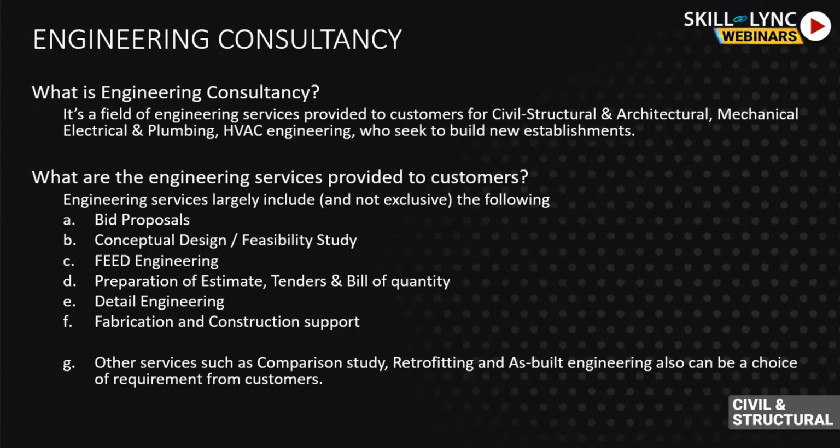So ultimately, this estimate proposal comes together with a bill of quantity and the tender for the third-party vendors, along with a preliminary set of architectural drawings, which would include mostly the entirety of the project: a basic plan, layout, and sections. Then we would start to get the costing from the third-party vendors, and the final costing would come up and start making some shape for the customer.